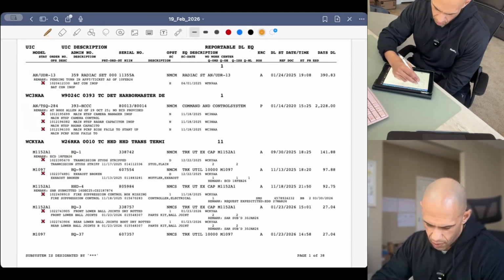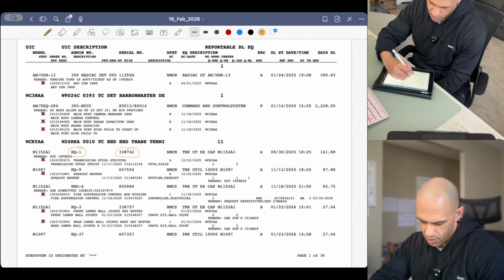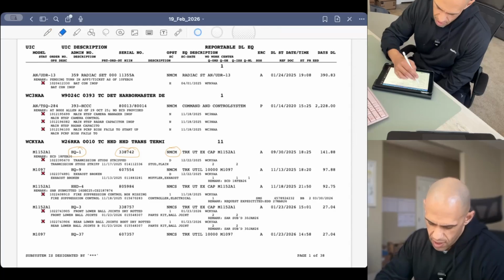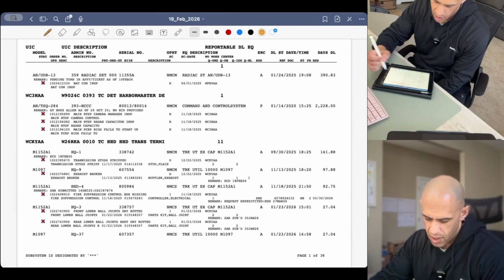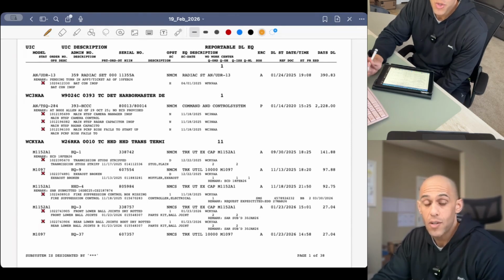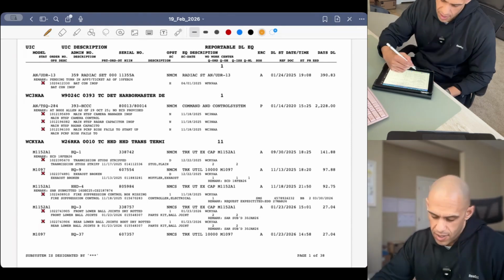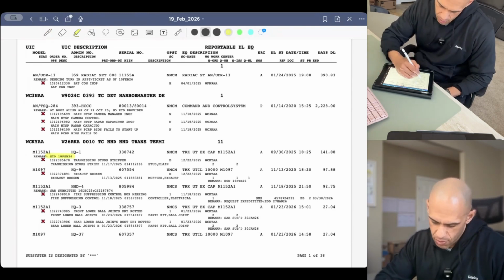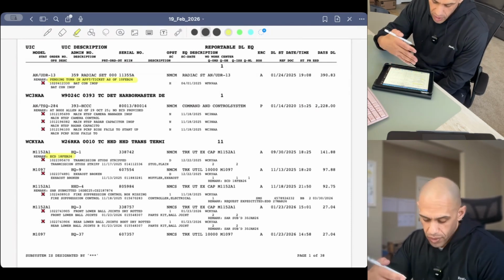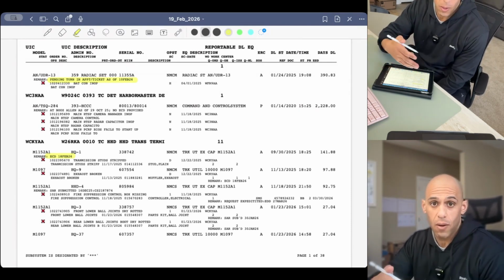When we look at this, we have our admin number, headquarters 1. It's our serial number for that vehicle. And this is an NMCM, non-mission capable maintenance. One thing to look for when you have NMCMs is to ensure that you know what it is NMCM for, and it should have an estimated completion date. That doesn't populate automatically. A lot of the time people think these remarks are added automatically. No, those remarks have to be manually inputted.